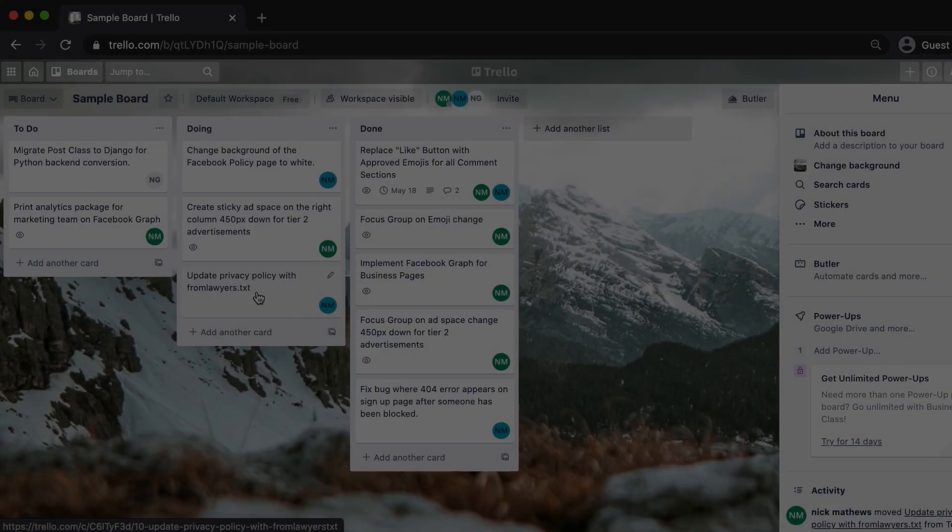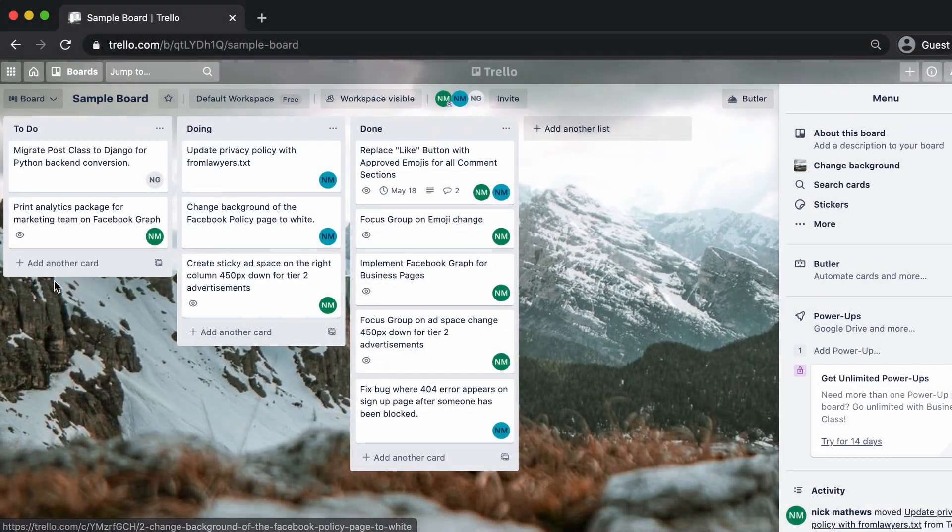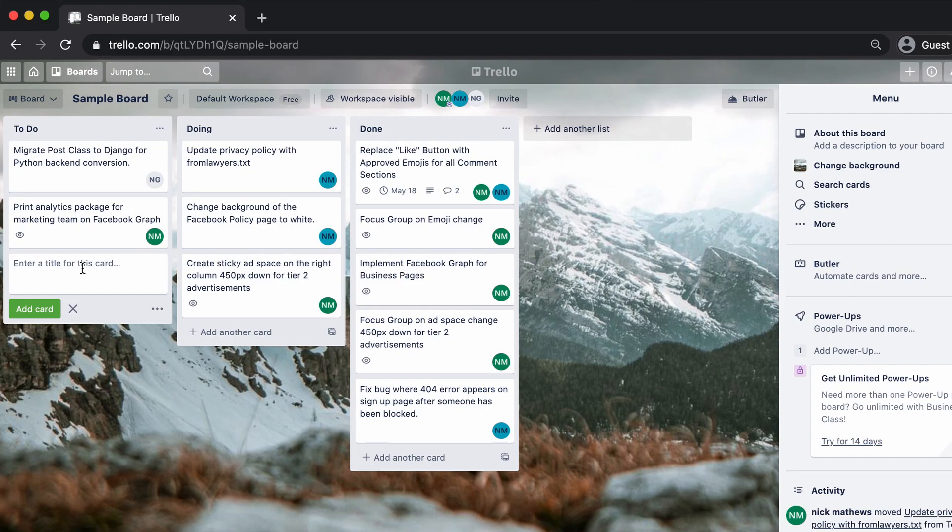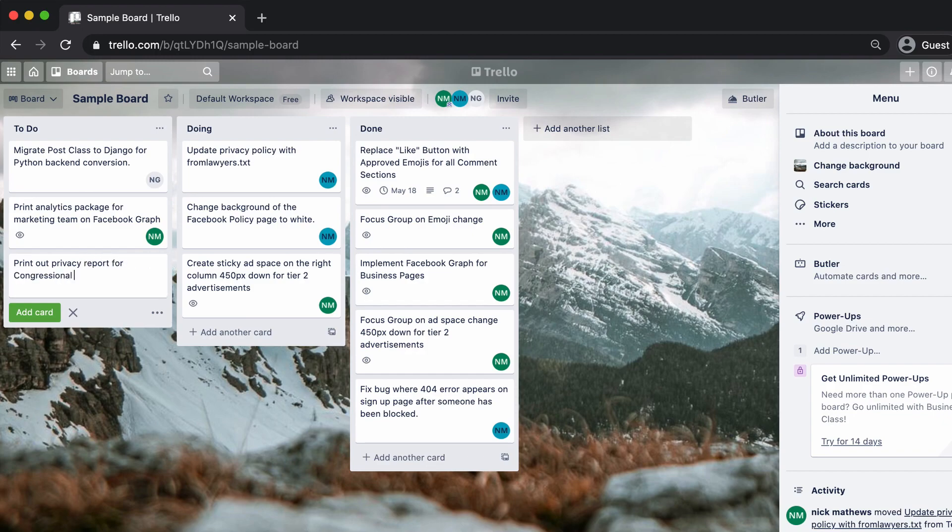Now that you have a very basic Kanban board, I recommend that you set card limits for each column to help your team focus their attention on just a few work items at a time. Thank you for watching.